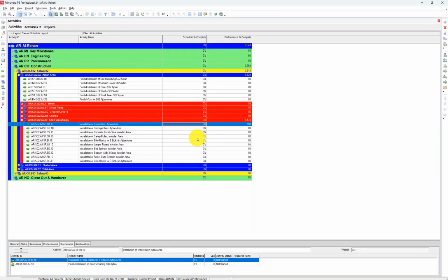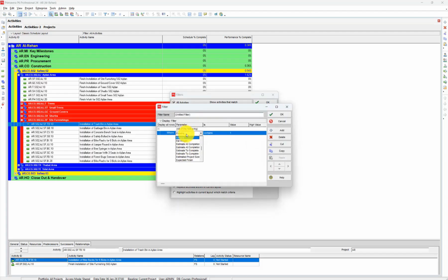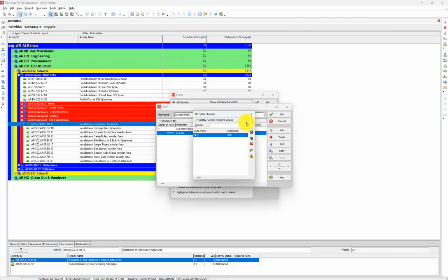Nothing has been done yet in Primavera. The first thing you need to do is refresh the data, so it captures the new data. All right, it has applied the filter. You did a refresh. By default, you have a filter that you save. What is the filter? You search for the word Oasis and set it to equal, and write the value, which is 1. Or you use contain and write the value, which is 1.